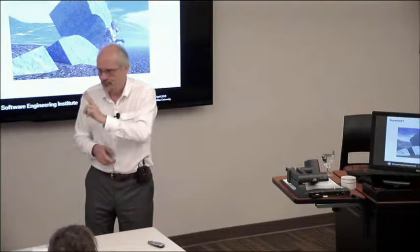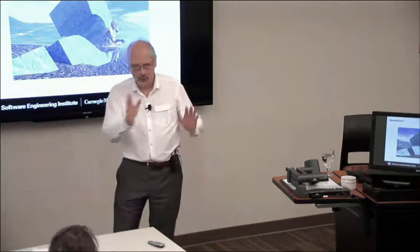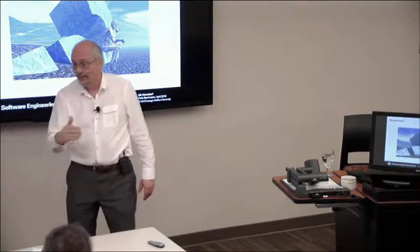Each period, you take two scenarios or use cases, you work through them, you do the design and the detailed design, and provide all the evidence, everything I said here. Every two weeks we sit together and do the review, and you convince us that it is right. So we always had a day for reviews, and then a day for the next thing. We had to have that to really make sure that if they went astray, it was not too far, so we could pull them in again, going in the right direction.